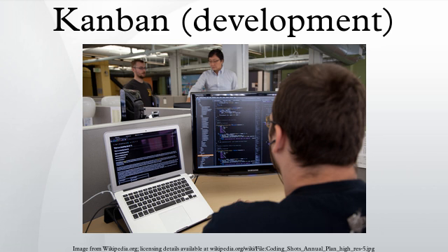The Kanban method. The name Kanban originates from Japanese, kanban, and translates roughly as signboard, or billboard. It was formulated by David J. Anderson as an approach to incremental, evolutionary process and systems change for organizations. It uses a work-in-progress limited pull system as the core mechanism to expose system operation problems and stimulate collaboration to continuously improve the system. It is rooted in 4 basic principles.